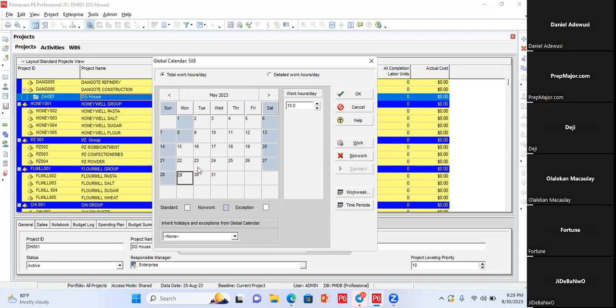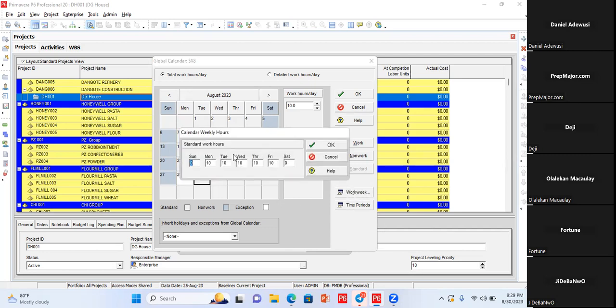Okay. So I'll set this calendar back to what we're trying to do. We said we maintain an 8 hours calendar. So we need to change this. We go to work week. We do 8 hours. Why I'm taking my time to do this is that it's the backbone of your plan. If you don't get this right, you won't get your plan right.